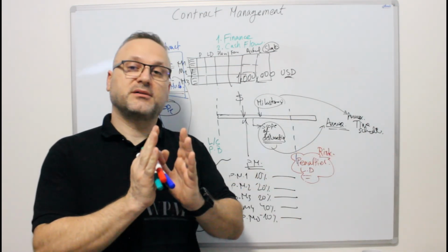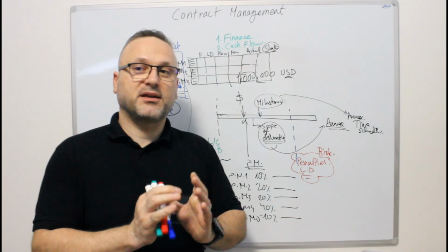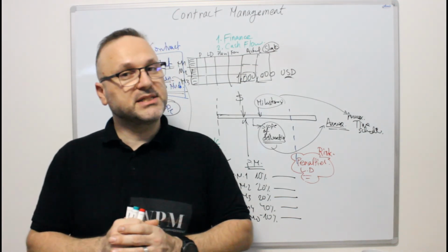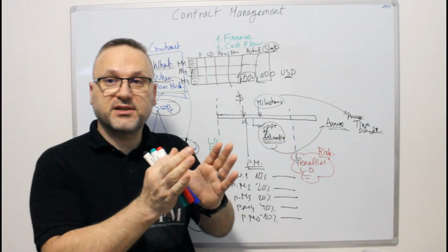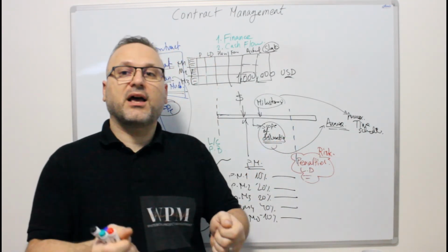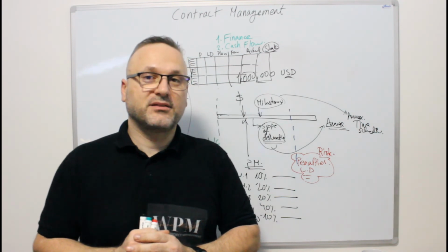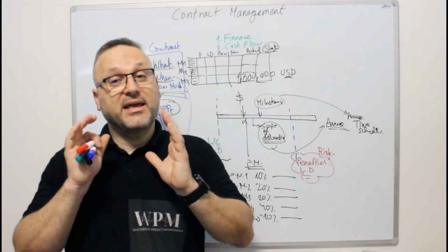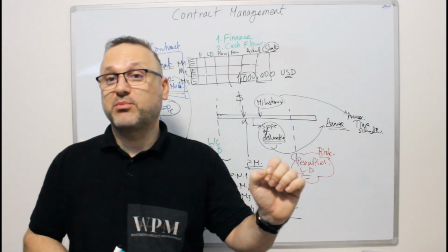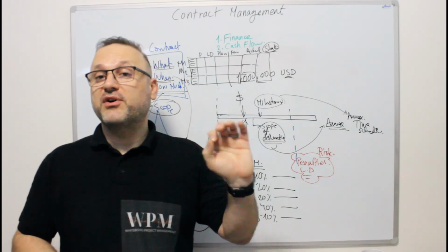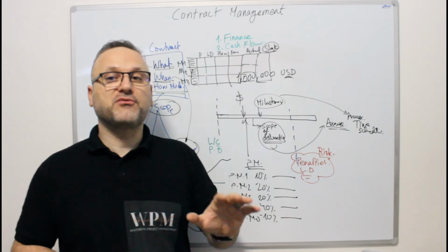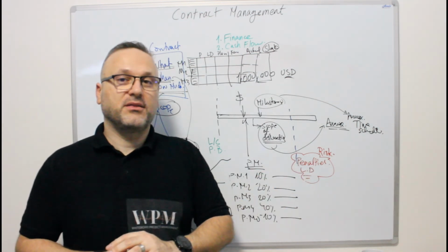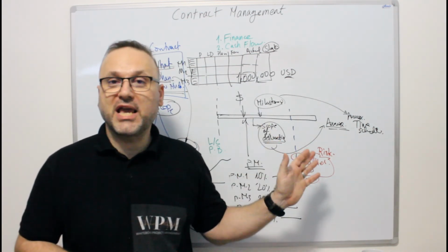It means you are sending this document on, let's say, a DVD, a CD, or a USB drive, or it could be a physical document. Prepare with it the transmittal, and the transmittal should be signed by the client confirming receiving it. Not confirming agreeing with what is inside, but confirming receiving this document. This is the official communication way.